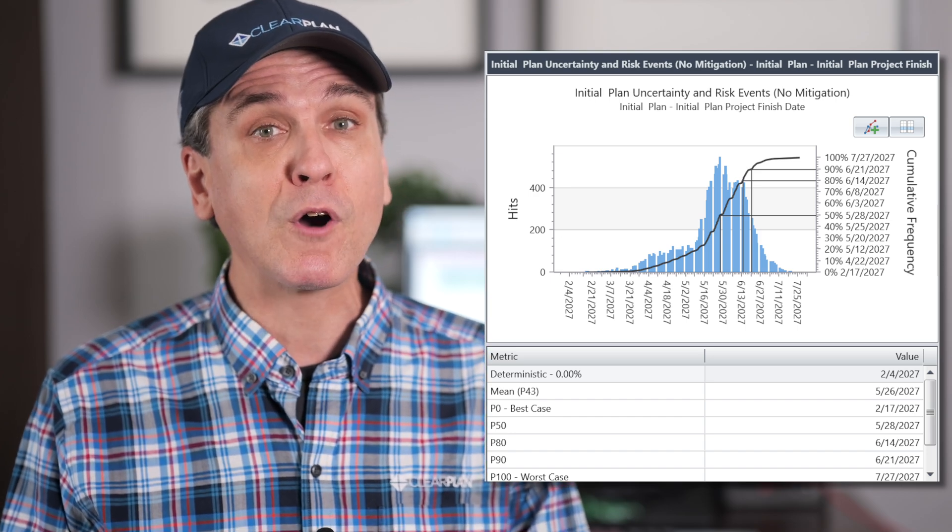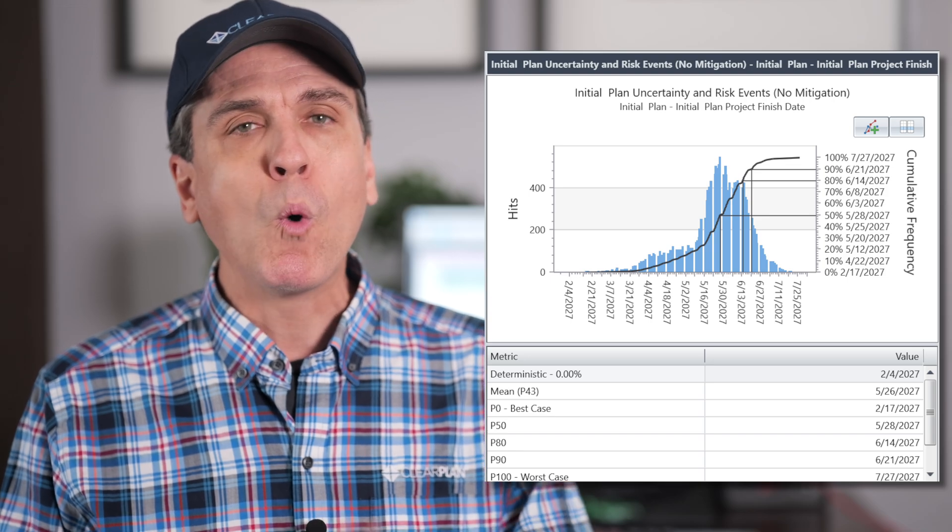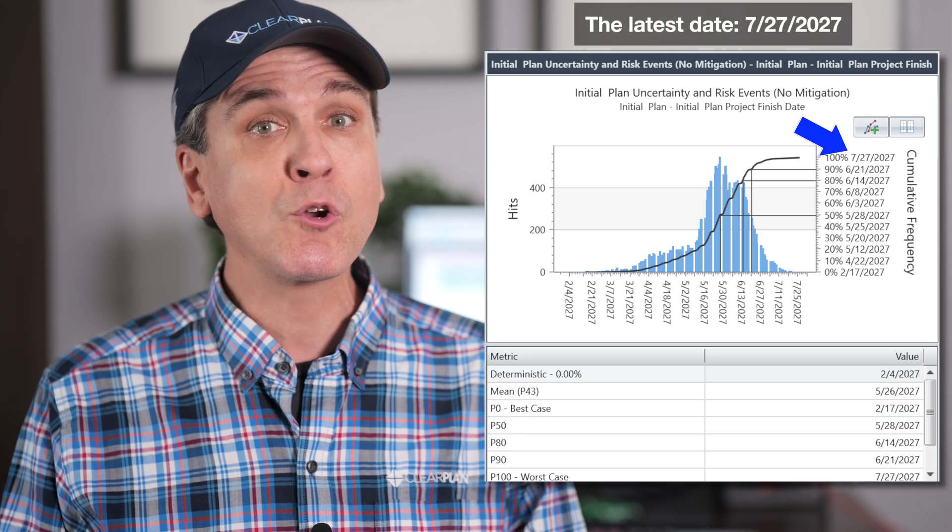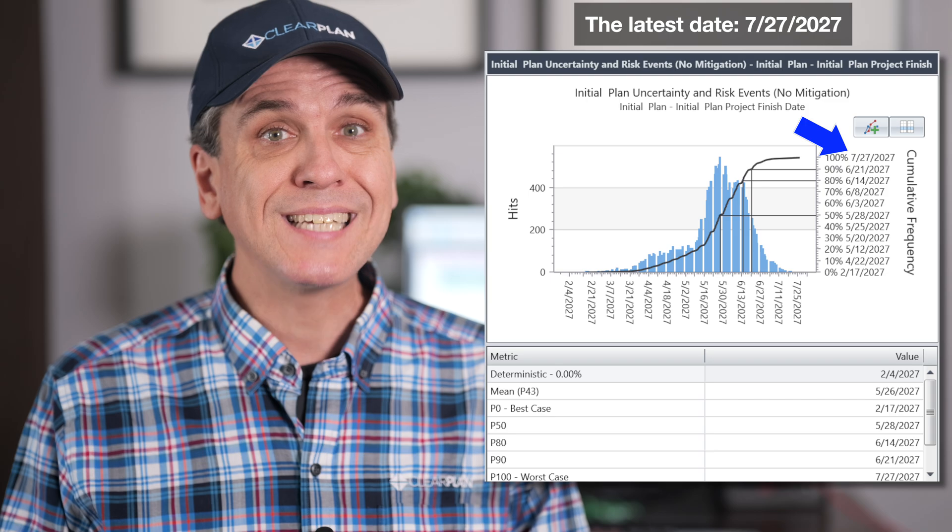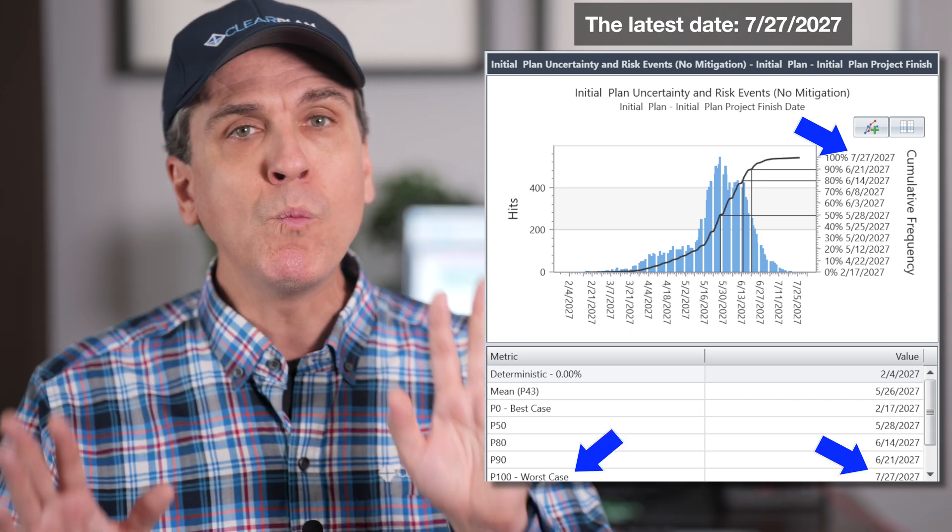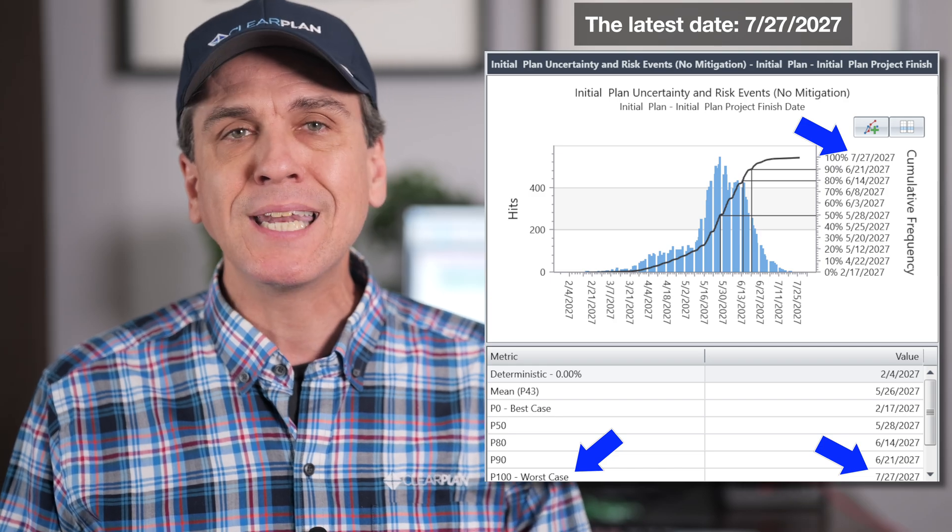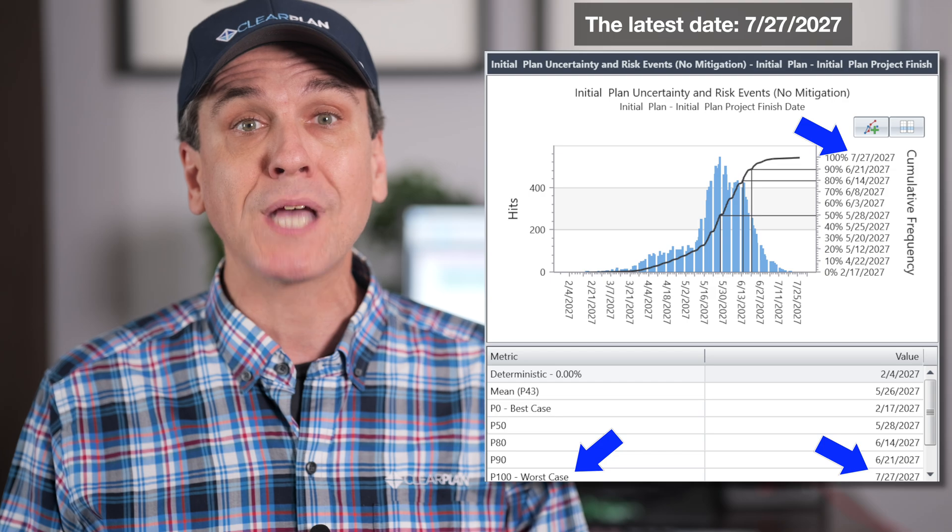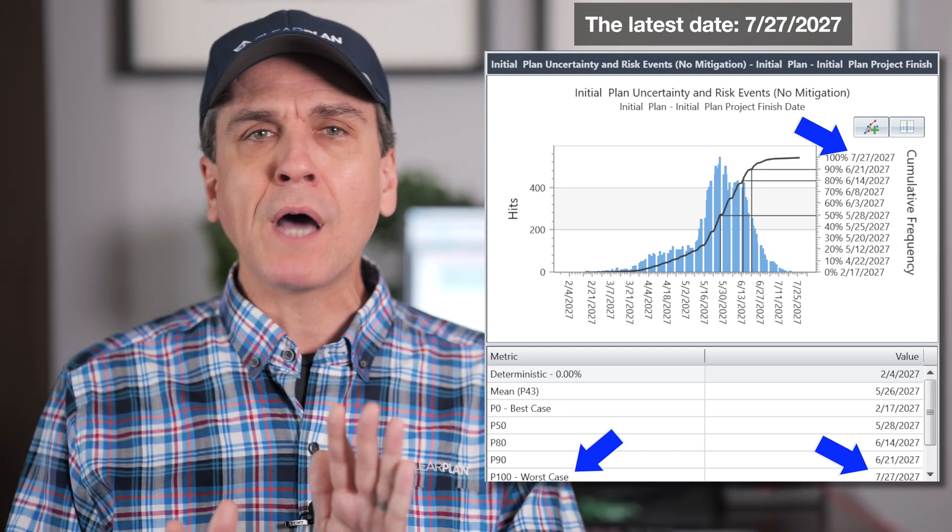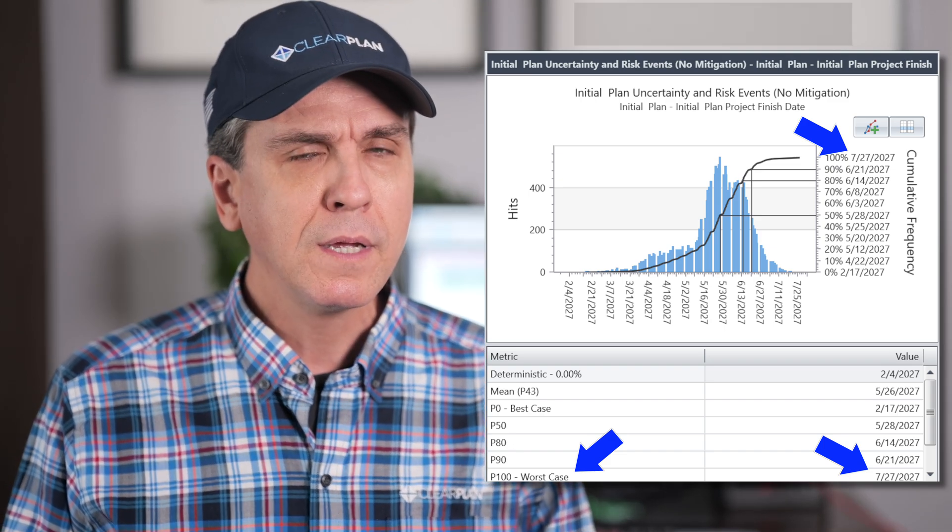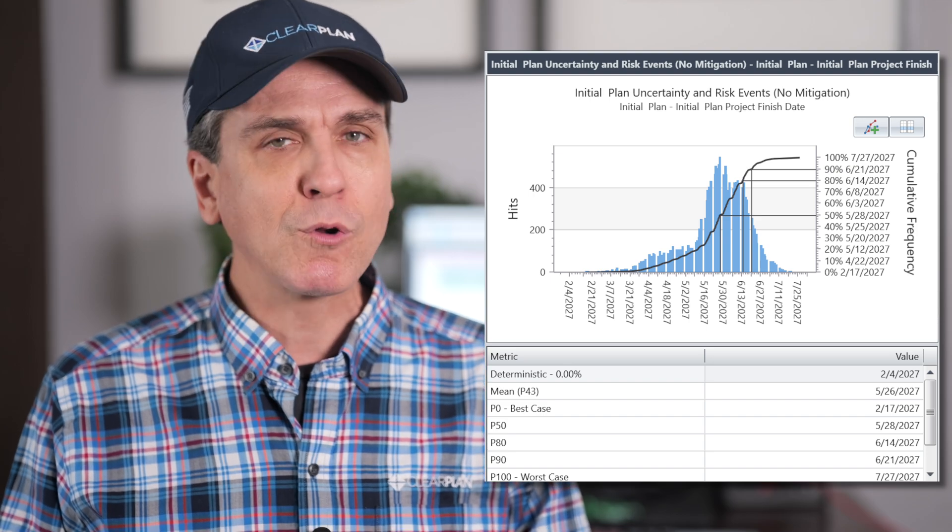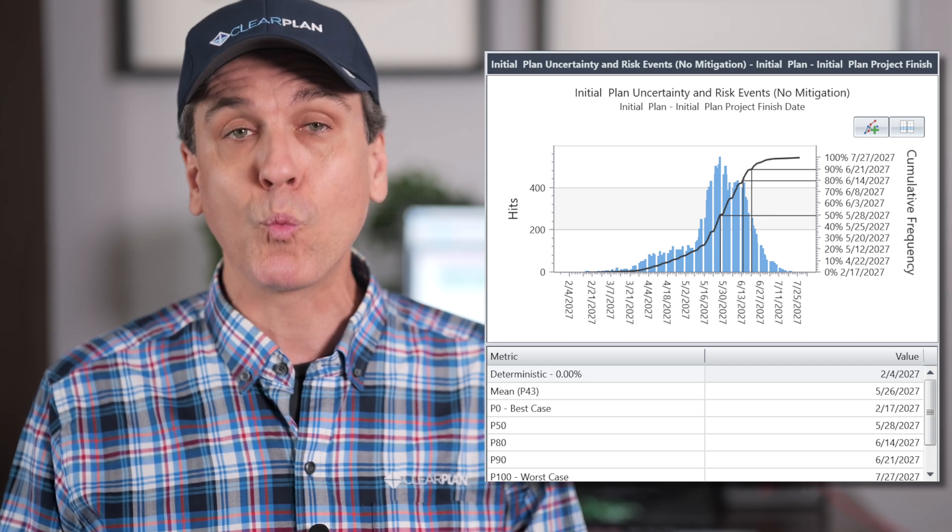Let's start on the far right. In the case of this project, we have 100% confidence that it will finish on or earlier than the latest date in the simulation results. This is known as the P100 date. If we want 100% confidence in a date that the project will finish by, that is the date to use as a guide. Most often teams do not necessarily advertise the P100 date.